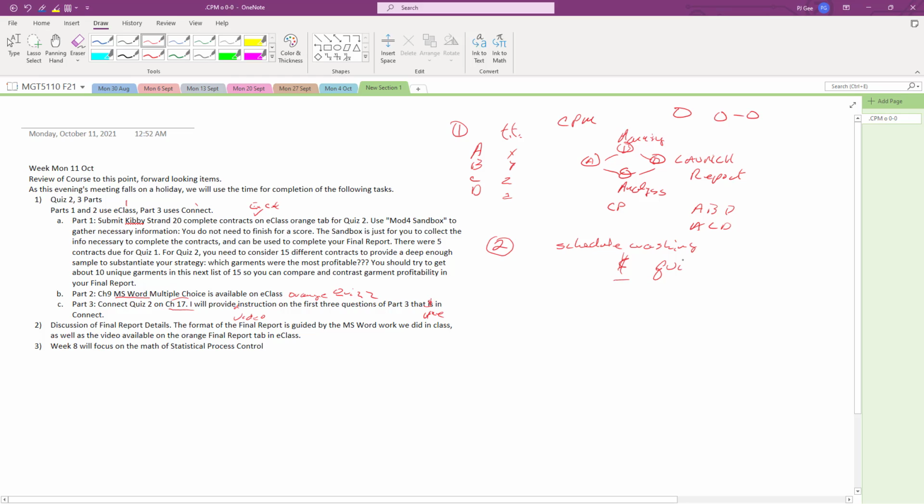So the way we think about it most often is, our standard process is this, and then if someone wants it faster, we'll charge for it because we know how to do maybe task B. We're really good with task B here. We've done it enough times, and we have cost-inducing techniques that we could perform in B in order to shorten the time it takes. So overall, the project shortens.